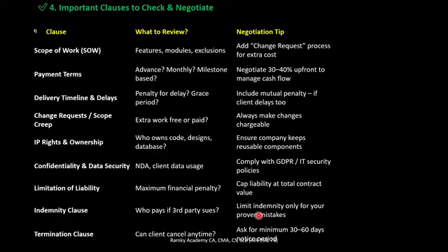For example, I am indemnifying you for my risk and rewards of what I delivered, up to a maximum of some 12 months fee payable. At the same time, I also indemnify equally, similarly, for 12 months fee payable. So this kind of indemnity for the work delivered by each party is to be limited to the extent of liability.